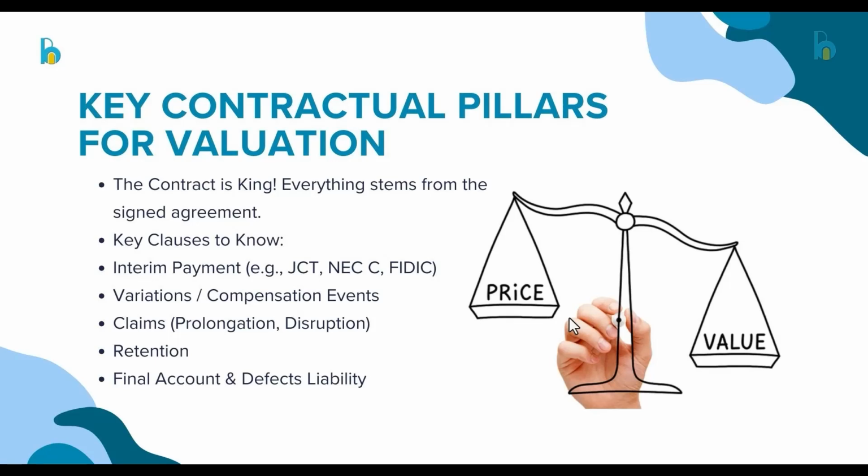So everything starts from the signed agreement. That is why, before you prepare any valuation, you need to know the contract agreement. What is the condition of contract? Very, very important. You need the contract document. What is the condition of contract? What has been set aside? What type of contract is it, before you move on to preparing your valuation, because that will determine the type of valuation you need to prepare, how you need to prepare it, and when you need to prepare it. Those things determine when to prepare valuation, how to prepare it, and a lot of other things.